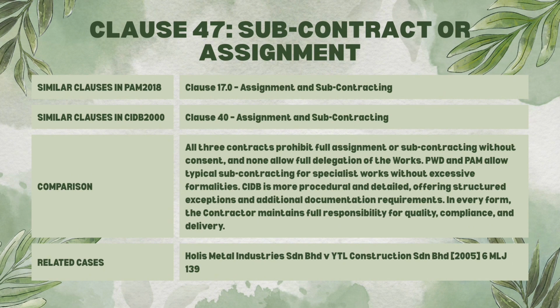PWD and PAM allow typical subcontracting for specialist works without excessive formalities. CIDB is more procedural and detailed, offering structured expectations and additional documentation requirements. In every form, the contractor maintains full responsibility for quality, compliance and delivery.